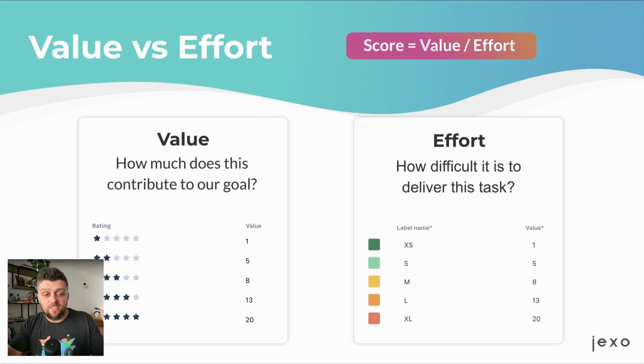Like, for example, t-shirt sizes, which from clothing are XS, S, M, L, and XL. So it's very easy to say, right, the bug's effort is XL to fix. It would be a lot harder for you to say that bug is a 20 or that task is a 5. We don't usually do that well with numeric values.